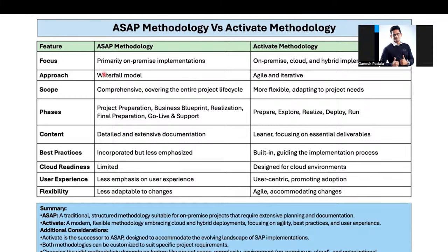So if you want to achieve 100, how do you sprint it into 25, 25? For this 25, the next 3 weeks, next 1-2 weeks, next 3 weeks, like that you can plan the sprints based on each phase of the activities, and the timeline can also be decided. All 25 doesn't need equal time, right? Certain 25 need more testing and all. That may be 3 weeks, another one 2 weeks, another one 4 weeks. Like that you can plan.